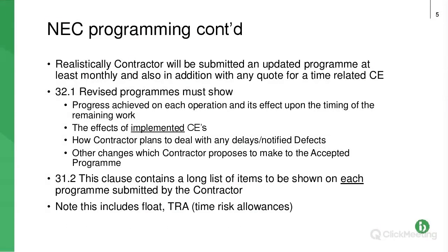So what else does it need to show? This third bullet point, how the contractor plans to deal with any delays or notified defects, and also other changes which the contractor proposes to make to the accepted programme.